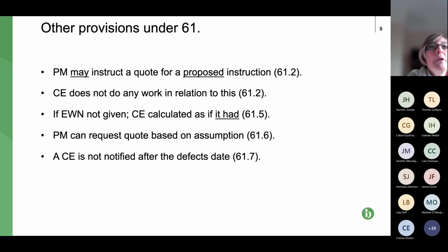The risk is that the project manager accepts and then the assumptions come to light, the contractor claims extra, and the PM argues a very strict contract point that I've already mentioned, that NEC doesn't allow the contractor to include assumptions. There's no case law on this, but the response would be that if the PM has accepted the quote, under general contract law, an acceptance of a quote has to be accepting all of it, otherwise it's not acceptance.